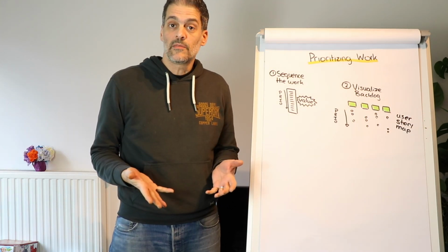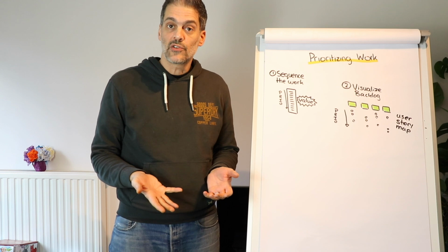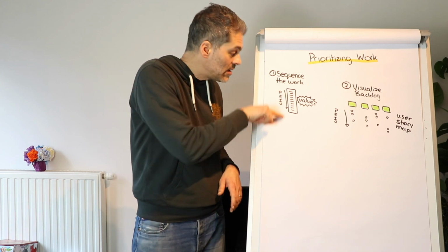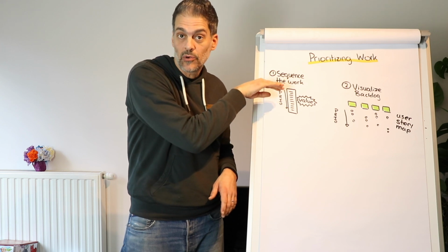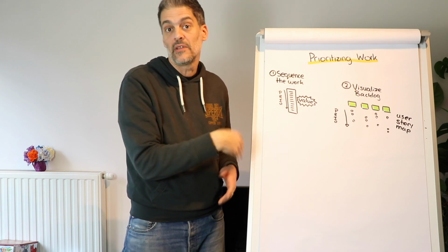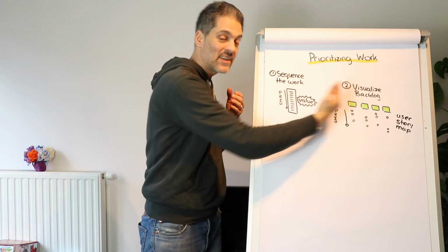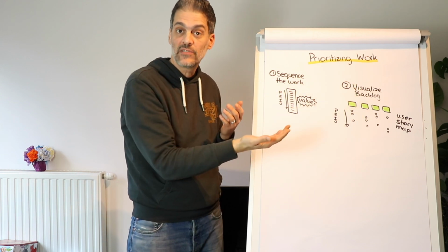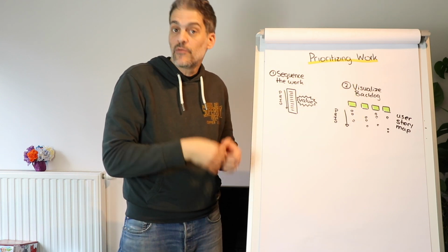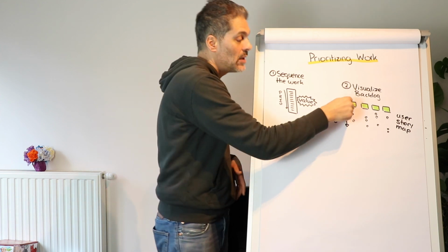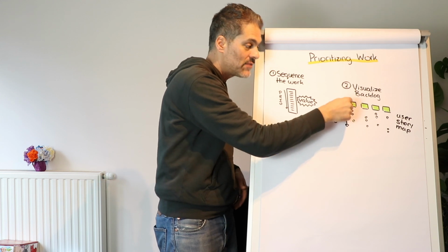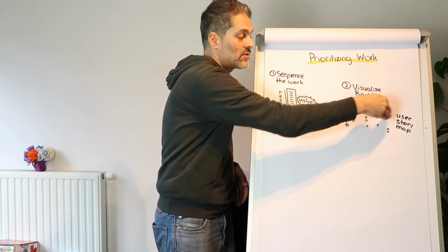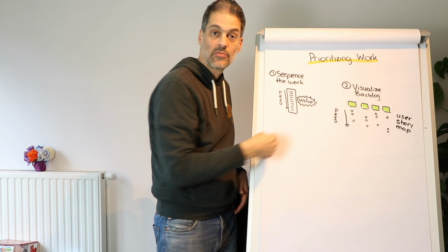So when we visualize a backlog, for example, using a user story map, what's happening there? We're keeping this axis of priority, so the things at the top are the most important things to do, and the things at the bottom are the least important things to do. But we're adding another axis, another dimension of context. For example, if you're a team working on multiple projects, maybe each one of these columns is a project, so you can first think about all the work you have to do for this project, and then think about the sequence you're going to do the work across all the projects.